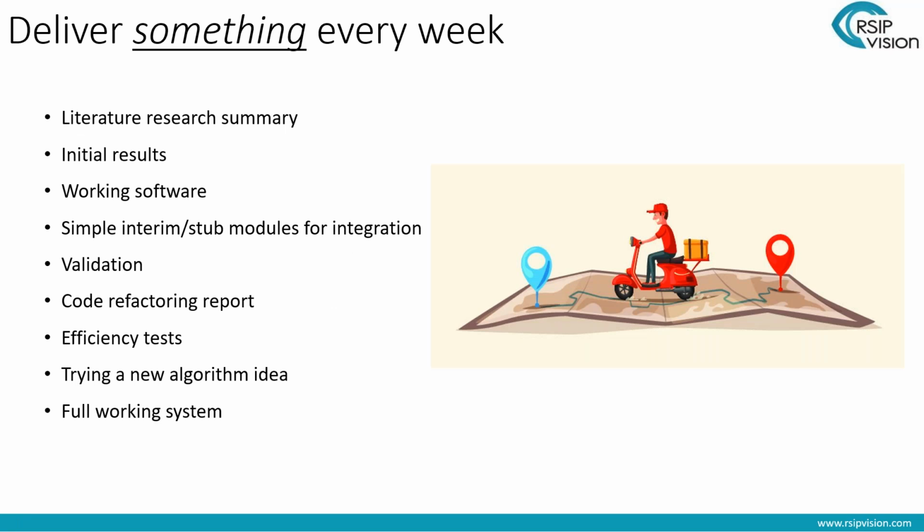Yes, so as Miki said, a proof of concept stage is usually a few months, and we aim to deliver something at the end of the concept, but actually something should be delivered every week. Or every 2 weeks at most. This is the typical agile development dogma, so to speak. You have a sprint, and the sprint has deliveries.